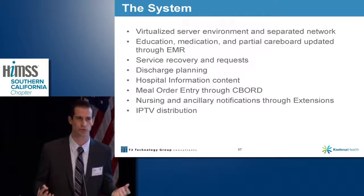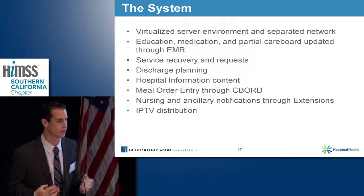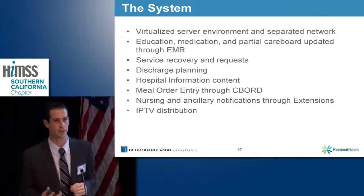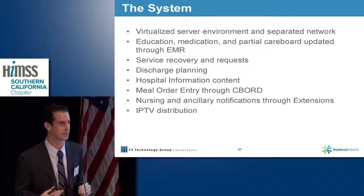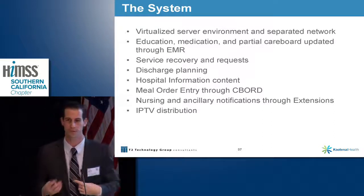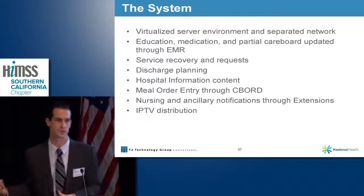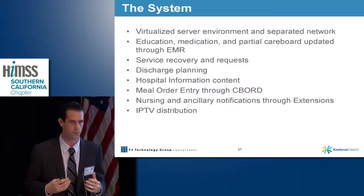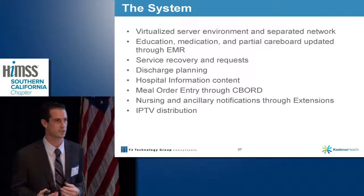environment, which we did a virtualized server and a layer 2 network. We created all these interfaces. I think we counted up to 6 interfaces with our Meditech system at the time. And that also included interfaces with our CBoard system and then with our extensions middleware system that sends alerts to nurses' phones. We had to put the time in for figuring out the service recovery and requests with all these